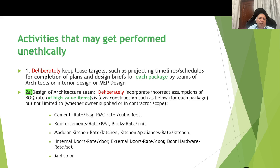Regarding activities that may get performed unethically: first, deliberately keeping loose targets such as project timelines or schedules for completion of plan and design briefs for each package by the teams of architects, interior design, and MEP design functions. Second, the architecture team deliberately incorporating incorrect assumptions about rates, particularly for high-value items — for example, rates for cement per bag, RMC per cubic foot, reinforcement per metric ton, or brick rates per unit may be kept on the higher side, as may modular kitchen rates or kitchen appliance rates per kitchen. Interior doors — rate per door, external doors, and door hardware — may similarly be kept on the higher side.